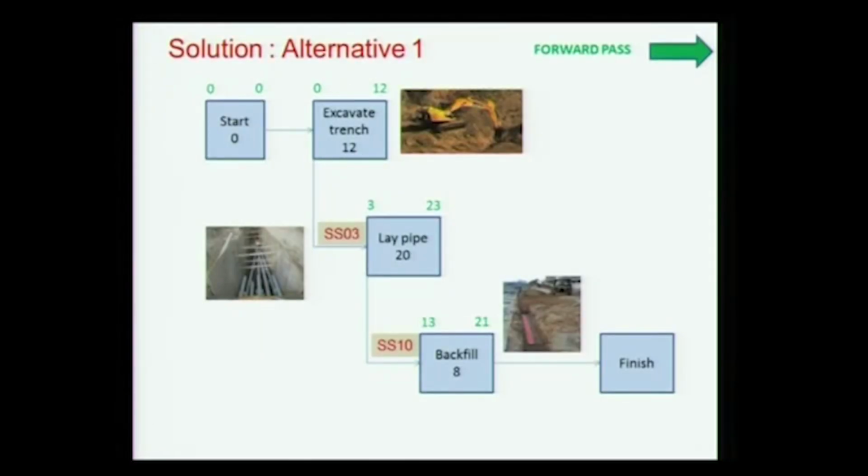Why would you? Oh no, it is a start relationship. If it was a finish to start, then it would be different. Sir, ideally we will be laying the pipes until 23 days, but backfilling will be completed by 21. So it is not possible. It is not possible, exactly. That is the point we are trying to illustrate.